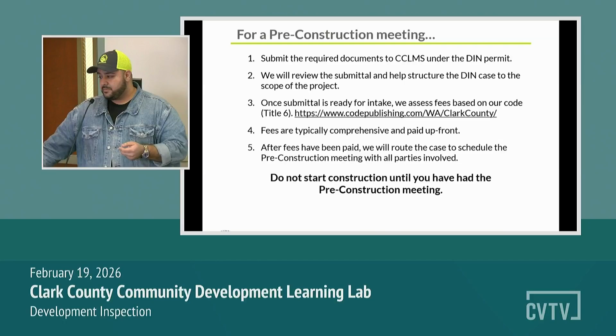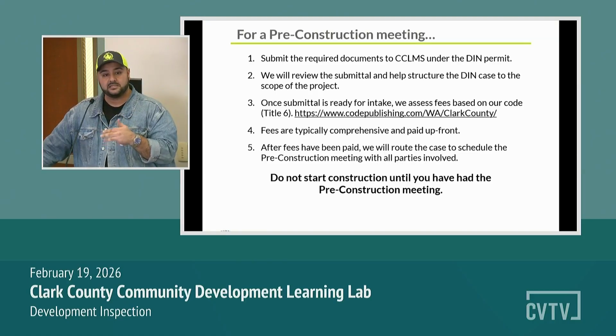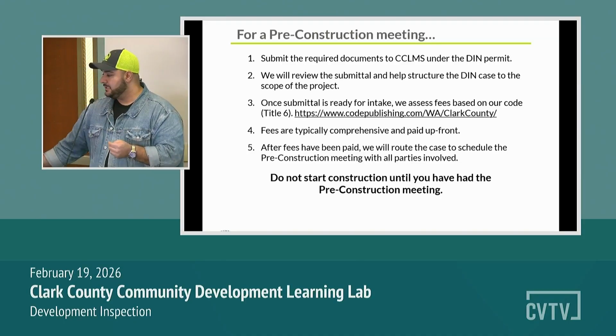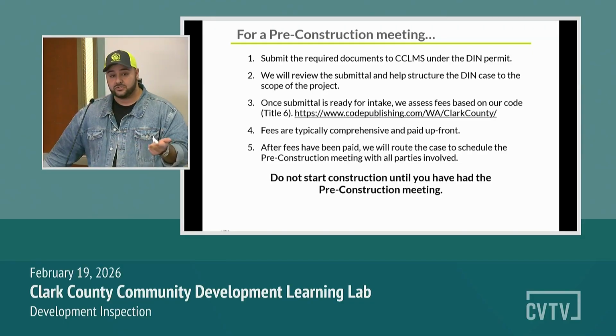The fees are comprehensive and paid up front, so you typically will not have, there are some situations where we might have what we call an hourly billing at the end. That isn't common anymore. Most of our fees are collected up front. So what you pay up front is for the duration of the entire development inspection case. And then after all fees have been paid, we'll route the case to schedule the pre-construction meeting with all parties involved.